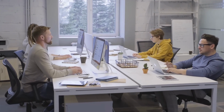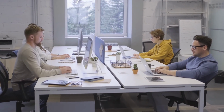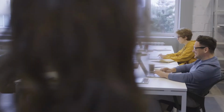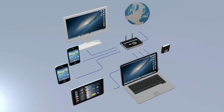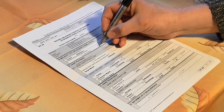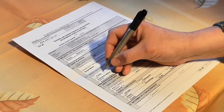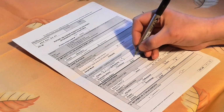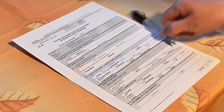10. Contracts and agreements. A project can have multiple procurement contracts and agreements. For instance, purchase orders for the acquisition of consumables, procurement contracts for the acquisition of services or the subcontracting of work, etc. You might be required to sign a contract when hiring staff or experts. Examples of contracts and agreements include a cost reimbursable and fixed price contract, a contract with a time and materials agreement, a contract with a legally binding clause, and many others. Other artifacts. The artifacts that fall under this category are user stories, team charters, bid papers, etc.